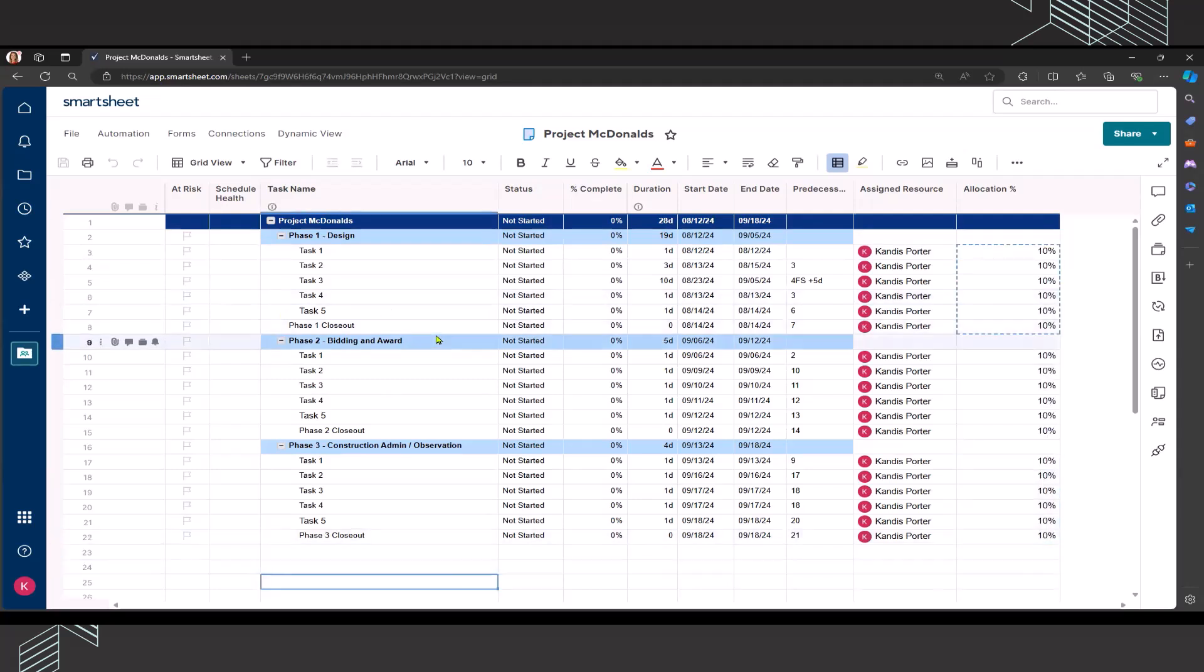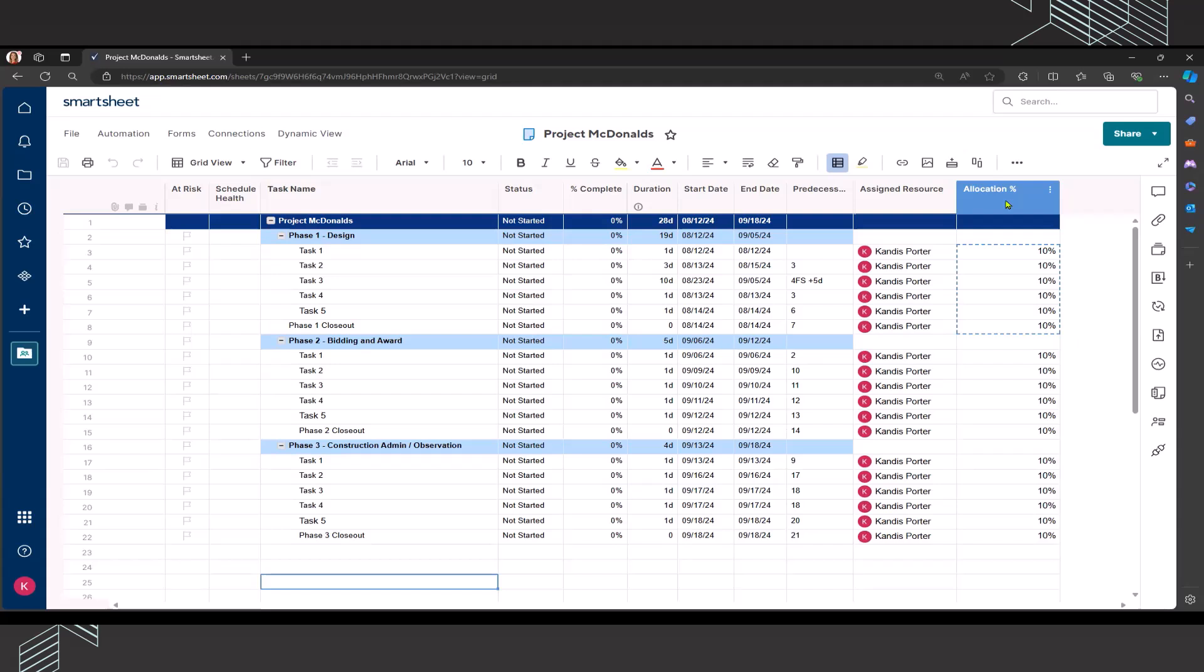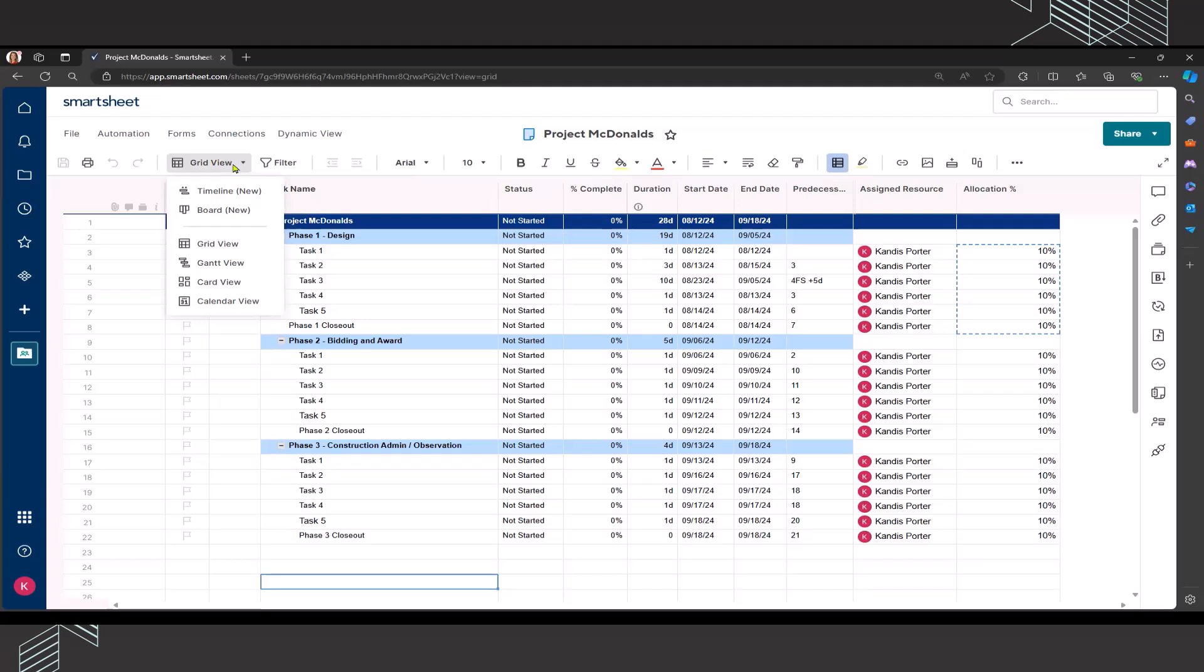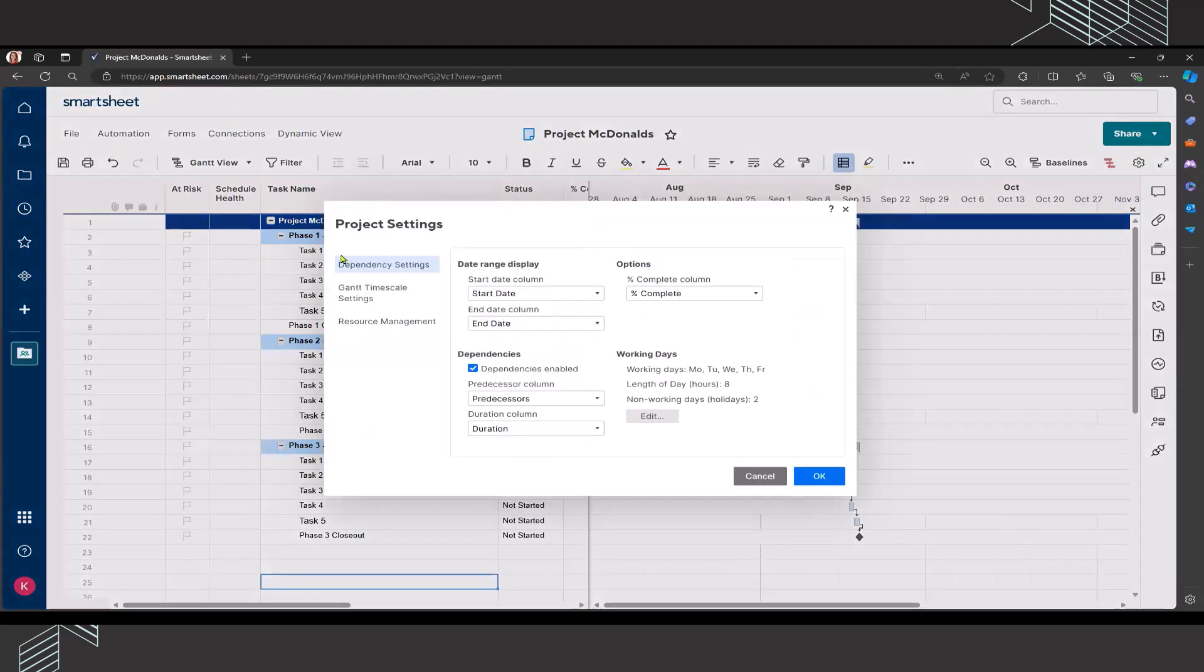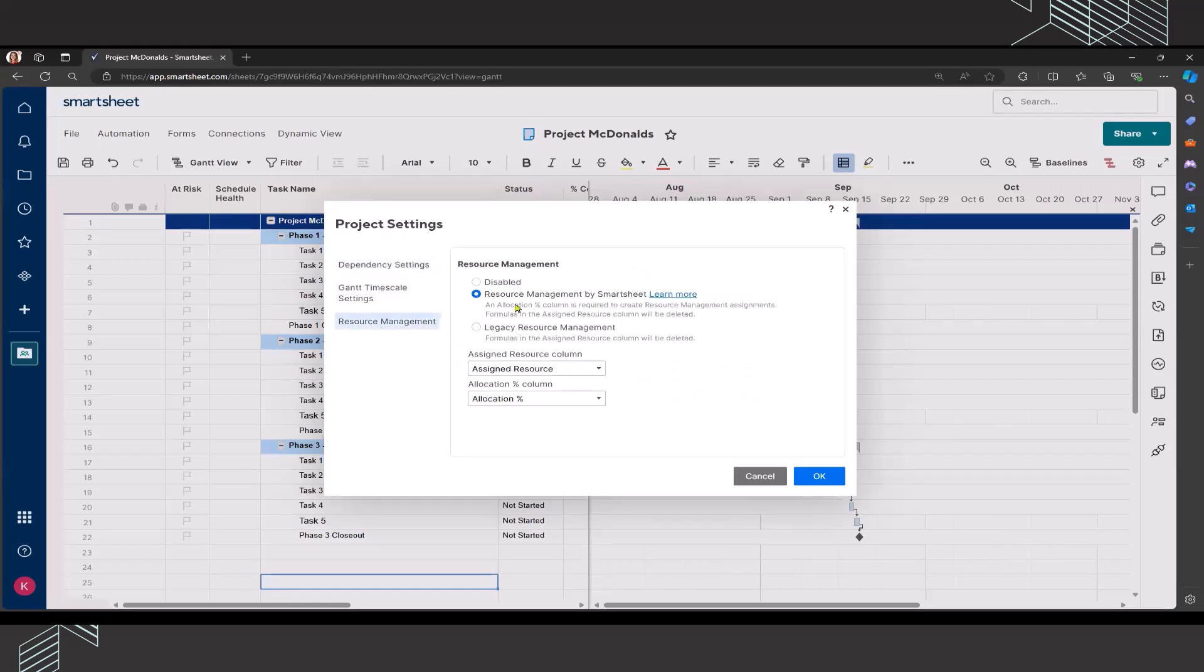If you already have the assigned resource and the allocation percentage in your project plan, there's another way of doing it. You can enable workload tracking and switch from grid view to Gantt view. And once you are in Gantt view, you can click on your project settings here. It looks like a little gear and then click on resource management near the bottom. Resource management by Smartsheet is what you're going to want to click on.